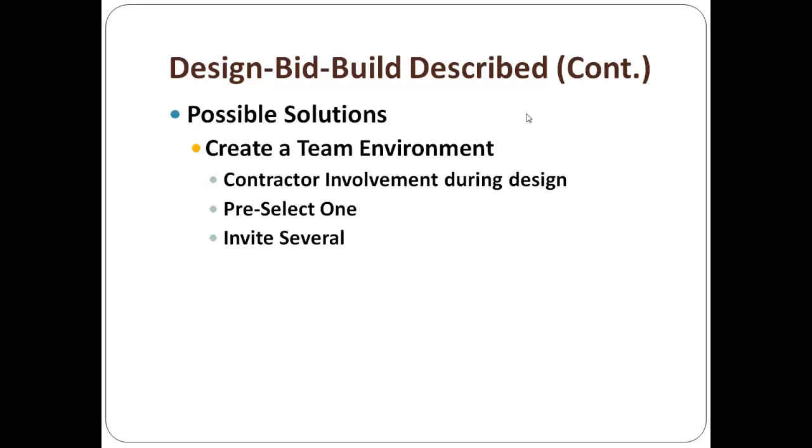And if one of the downfalls of the design, bid, build delivery system is that the plans, when put out to bid, come back well over the expected or set budget for the building and the site work, then you can fix that by involving the builders during the design phase.